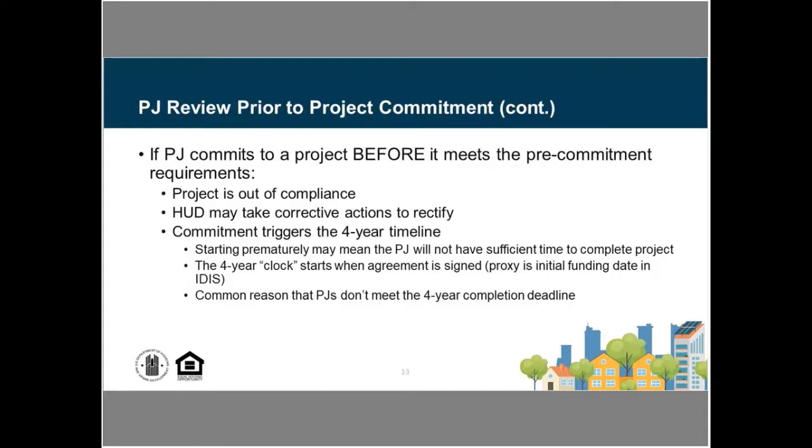And so we know that everything's in place, our environmental review is in place, the release of funds is in place, or we have a very clear plan and a conditional award based on that, and that they really are ready to proceed on that to meet our deadlines.